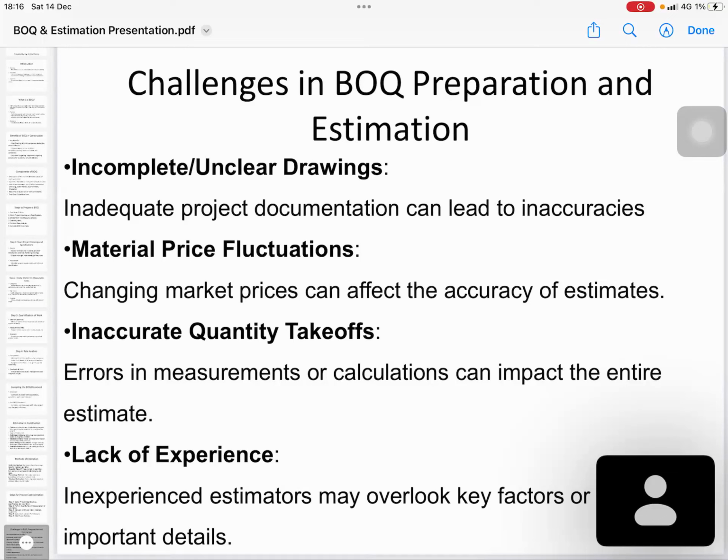Today they agreed to some prices, but next week you can't do it. Likewise, because your diesel price increased from 120 to 400. So with material fluctuation, it's very challenging when you are doing the cost estimations.